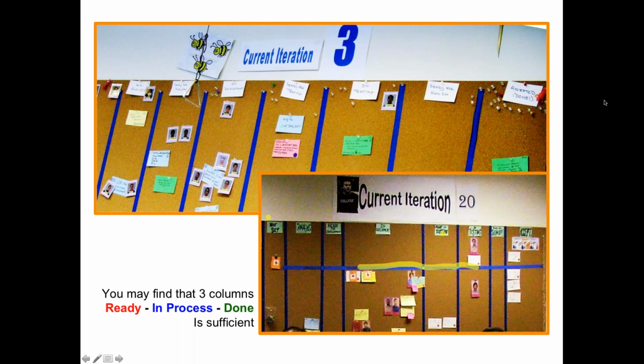And here's another way of showing that we saw a team do their current iteration. So stories at the top, tasks in yellow stickies, boxes on the sticky filled to indicate how far along the work was. So you'll see some of these stickies have boxes that are empty, some are fully filled in, and some are partially filled in. So that allows them to track the progress of the tasks, and red card is for blockers. These sorts of visual management systems are really easy to work with, and the key is all of the information is available, just like a pilot cockpit.